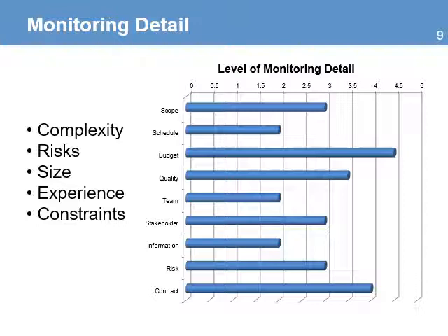The areas that require less effort during monitoring are the processes that have a low score. For example, there is need for less monitoring on the process to manage the team and information, which could mean that you have a team with experience and you have low information requirements. It's important to make this analysis. You don't need to use the same level of effort on all 9 processes, but you need to identify the areas that require more attention.